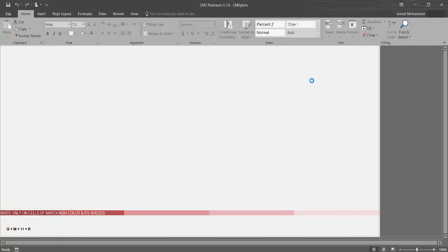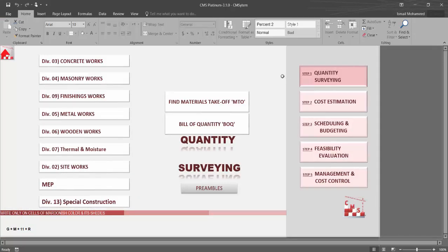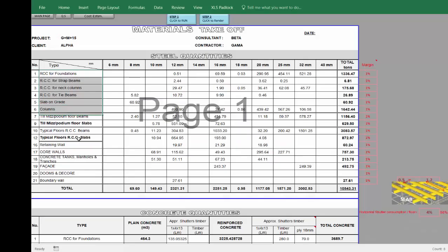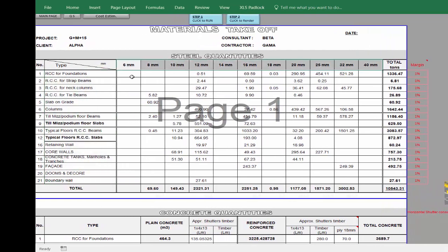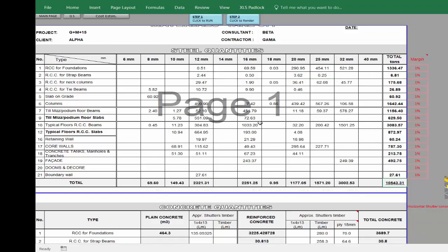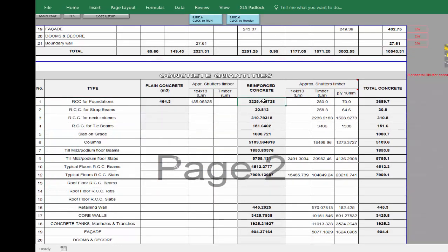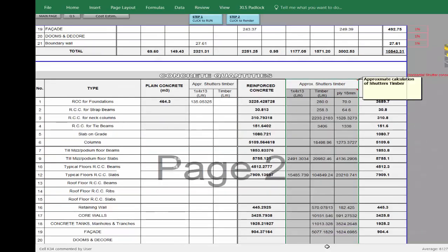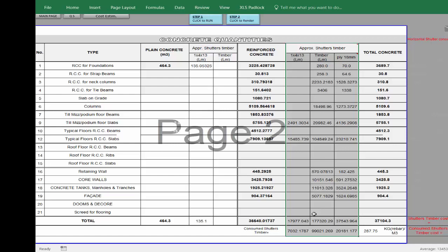When you continue, all data produced from quantity surveying is reflected directly in the material takeoff. Here you see all types of concrete, all rebar per diameter, and for each member a detailed quantity of rebar. At the end you have the full quantity required for the project plus concrete breakdown — reinforced or plain. CMS also gives the approximate shutter required for all concrete elements plus the shutter margin, which CMS uses automatically to calculate cost for each concrete element.